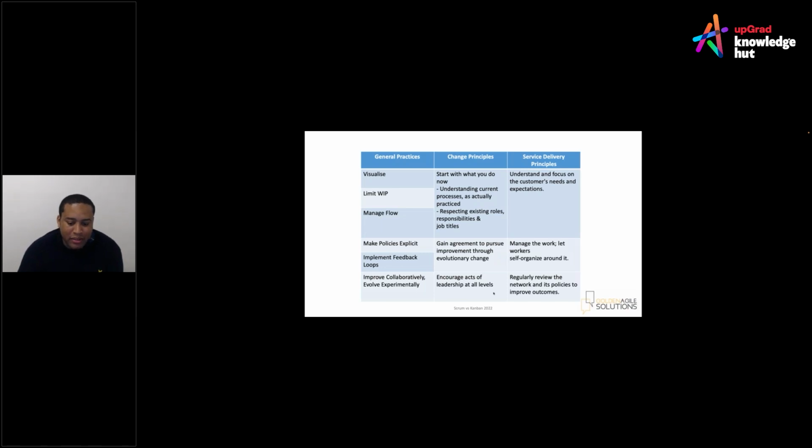So as I go on to the next slide, I'm going to present to you a Kanban board for software delivery. Now it's very animated. There's a lot happening here. We've got policies, you've got to do, and in your to do column, you've got an infinity logo underneath the to do, and that says the amount of items in that column is countless. You can have as many items in your to do column as possible. And then we go into development, and development are telling me they can only work on 5 items at any given time. And we've split development into code review, unit test, and dev done.